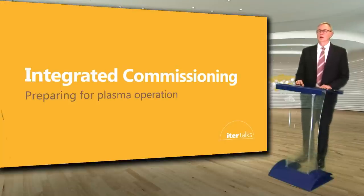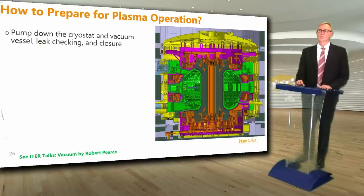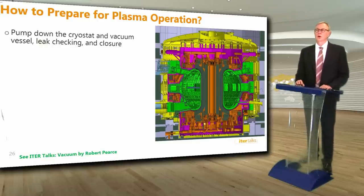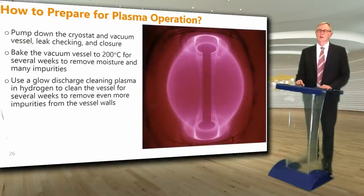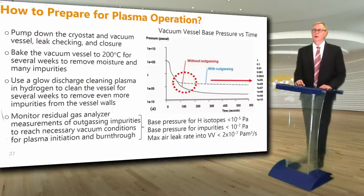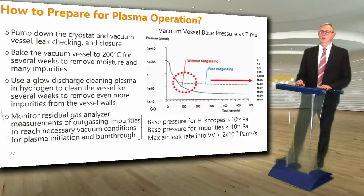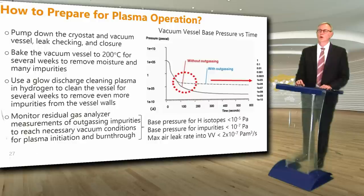Once the tokamak is assembled and the cryostat is closed, we will begin integrated commissioning to prepare for ITER operation. First, we'll pump down the cryostat and vacuum vessel and check for leaks. Then we'll bake the vessel to 200 degrees centigrade for several weeks to remove water and many impurities. We will run a low-density, low-temperature glow-discharge cleaning plasma in hydrogen to remove more impurities from the vessel walls. Then we'll monitor residual gas analyzer measurements of outgassing impurities to reach the necessary vacuum conditions defined in terms of achieving low base pressure for hydrogen isotopes, even lower pressure for impurities, and below a maximum air leak rate.